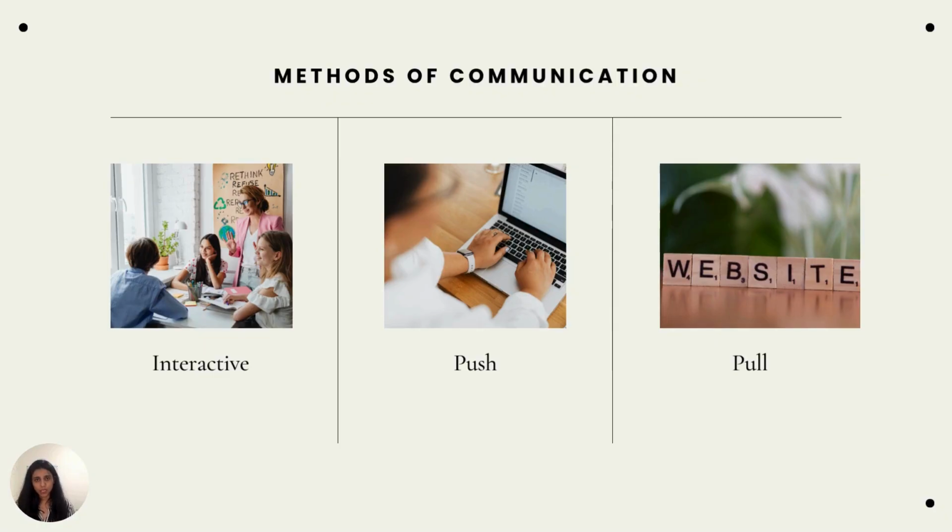So let's look at what push communication is. Information sent to specific recipients without requiring immediate feedback. The sender is responsible for ensuring the information is sent. For example, memos, reports, emails, and press conferences. That's push communication. You give out the information to the public or to somebody, right? That is pushing the communication. It is for information that must be received, like mandatory safety updates or meeting minutes.